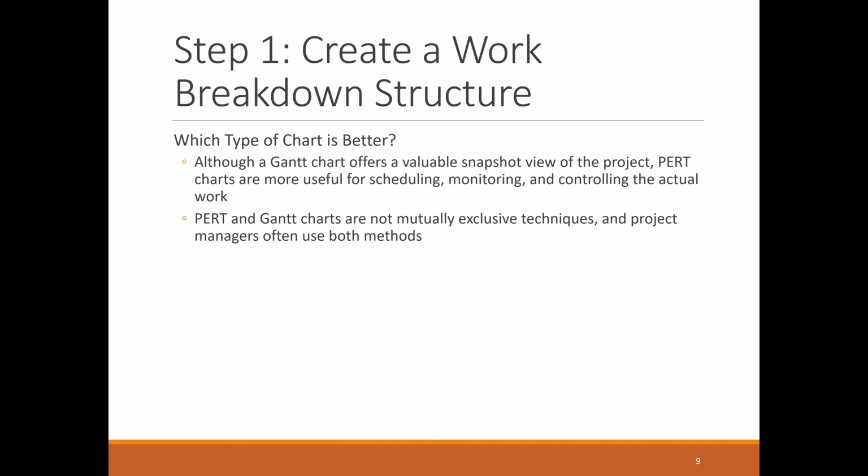And also, what about the control? If you know that development team A is slow, and it may cause module 1 to be slowed down, and it affects the whole project, because the integration test cannot be done if module 1 is not finished, then it might be the time for the project manager to urge or inform development team A that you have to speed up, because right now you are almost behind the schedule, something like that.